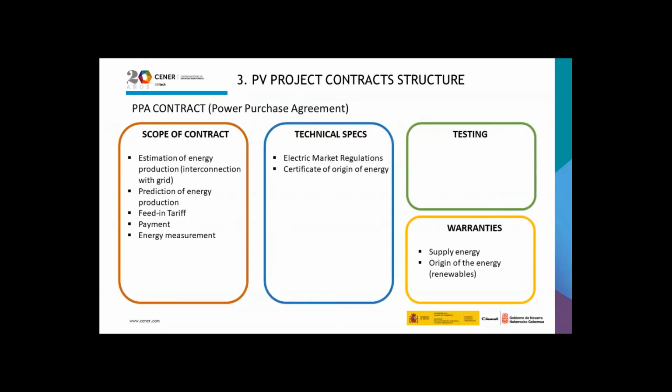A power purchase agreement, PPA, or electricity power agreement, is a contract between two parties, one which generates electricity and one which is looking to purchase electricity. The PPA defines all of the commercial terms for the sale of electricity between the two parties, including when the project will begin commercial operation, schedule for delivery of electricity, penalties for under-delivery, payment terms, and termination.